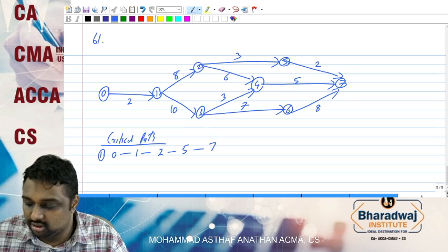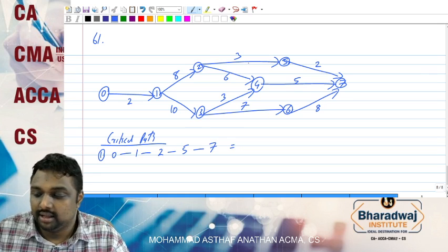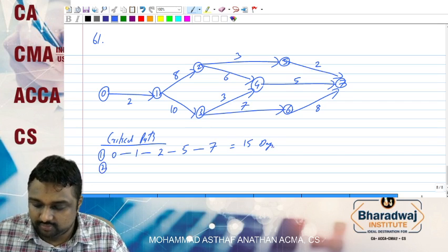5, we can go for 7. So how many days? 2 plus 8, 10. 10 plus 3, 13. 13 plus 2, we take 15 days.